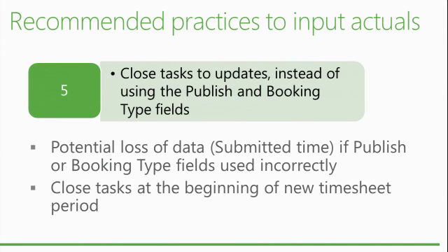So you can hide things from the user in PWA by switching this flag, publish and not publish, okay? There is another way, the booking type, to basically filter also information about resources, where when you book the resources, you have different types, right? Committed and proposed.